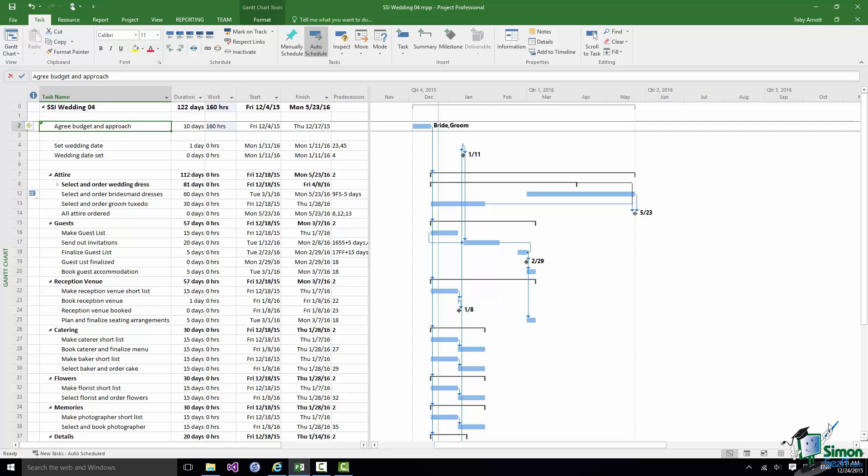I pointed out to you much earlier in the course that in the Work column there was zero hours of work because we had no resources assigned to that task. As far as Project 2016 is concerned we have now taken a ten day task and it defaults to an eight hour working day. So ten days for eight hours a day is 80 hours. And when I assign two people to it full time that is 160 hours of work.